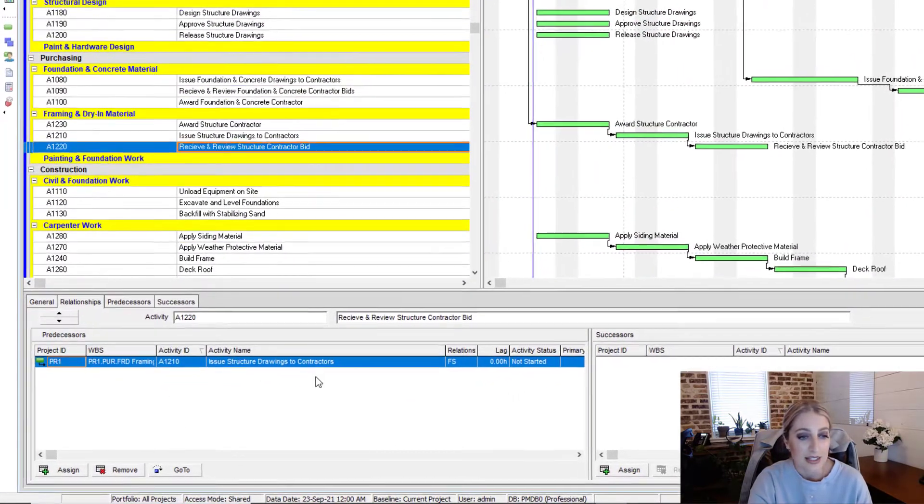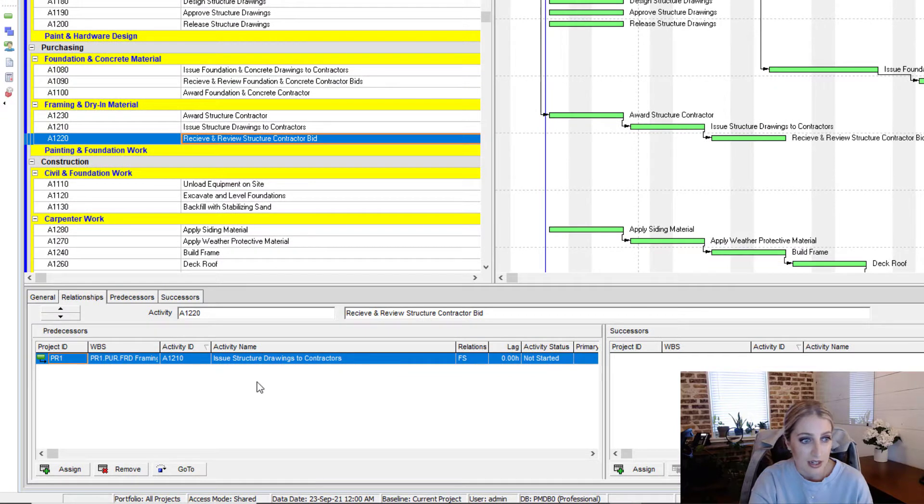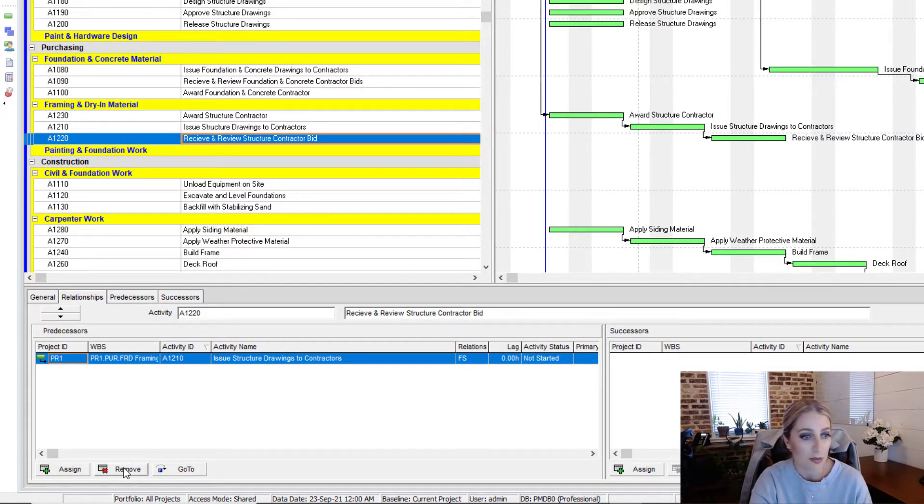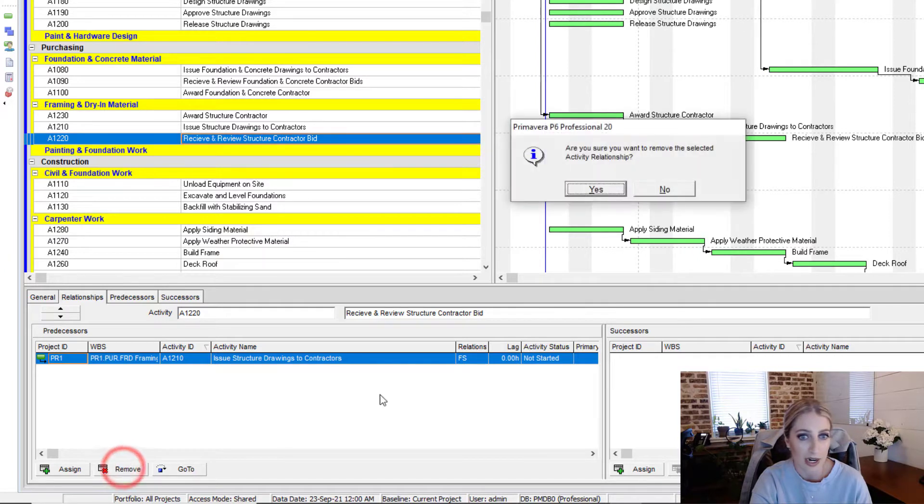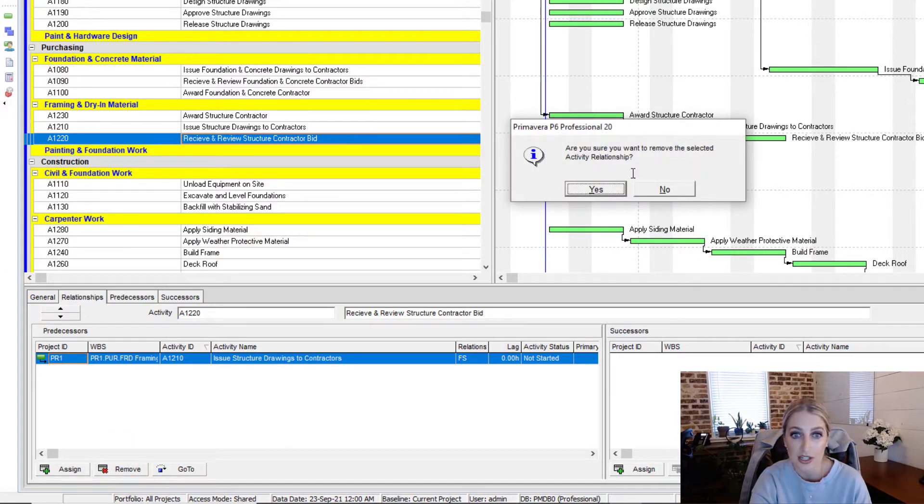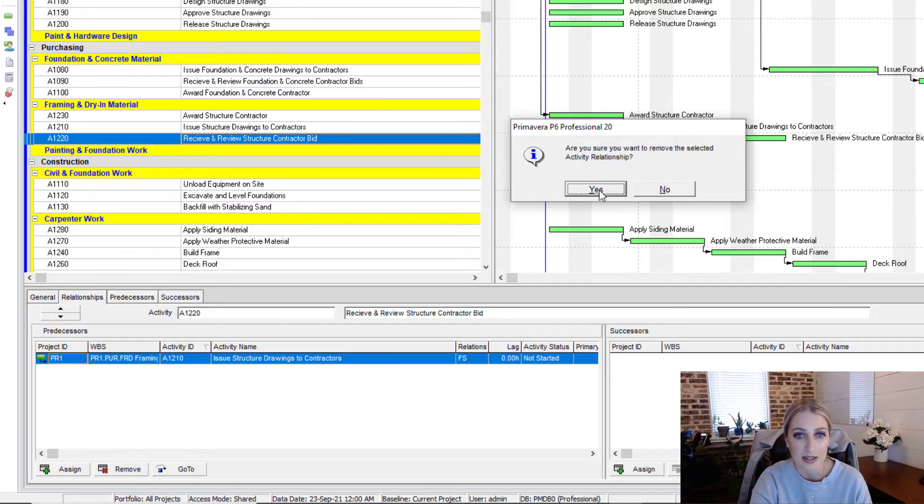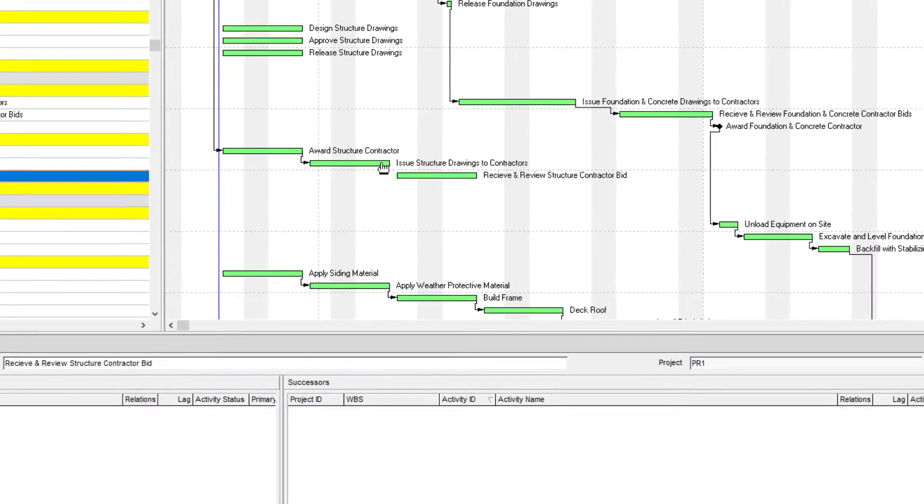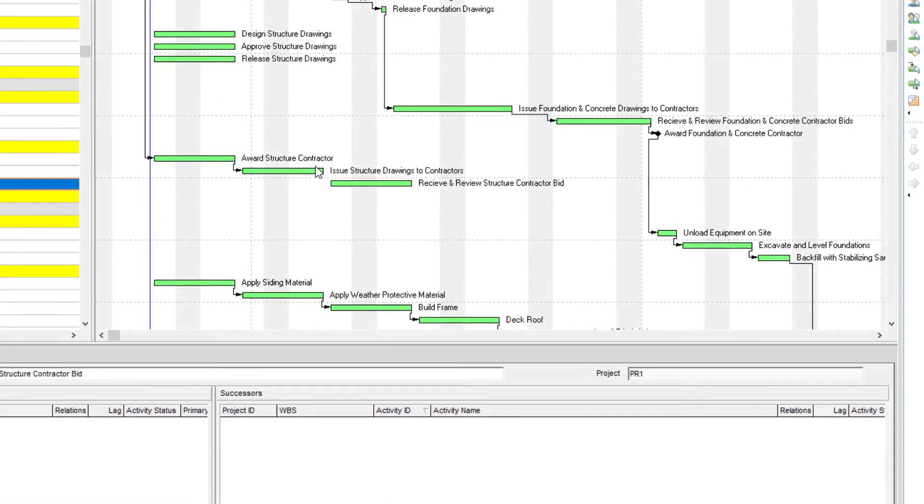So we see that this activity has a predecessor. And then to remove that, all we have to do is click on remove right at the bottom. Are you sure you want to remove the relationship? We select yes.